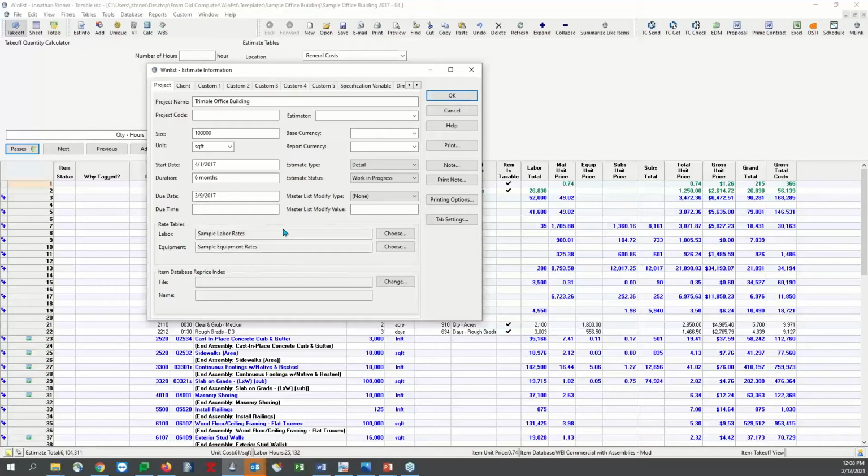You've got these tables here. You have an overall labor and equipment rate table that will handle all of your rates. You can have your rates just stored inside of your database. Let's say you only do open shop work, so you're only dealing with your own rates that you've sat down with the accounting team, and this is what we're going to have for a laborer, for a carpenter, and that sort of thing.